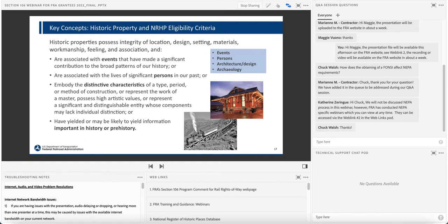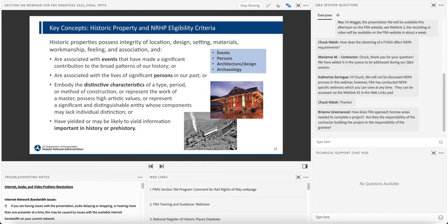Due to the age of railroads, there are many examples of railroads and rail infrastructure that are listed or eligible for listing in the National Register. While archaeological remains of railroad infrastructure are not generally encountered on most projects, railroad infrastructure may still affect archaeological resources unrelated to the railroad, such as prehistoric or historic sites that predate the railroad, including those that have significance to tribes, such as burials or habitation sites. These must still be considered during the Section 106 review process.